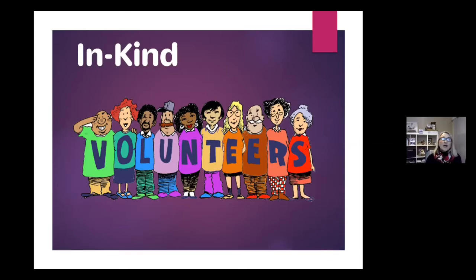We see it as the entire project, because if you've got $1,000 worth of income and you have 10 people working for $10 an hour, that is another $1,000 worth of income. We don't see it as cash, we see it as in kind, but the project is now twice the size. You can't deliver your project without these free in-kind contributions. So it's important to show the funder what that looks like in its entirety, so they fully get a concept of how expensive it is to do what you're doing.